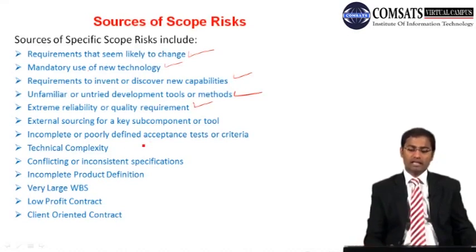External sourcing for a key subcomponent or tool. You are relying heavily on your suppliers, and one of the suppliers has faced a financial crunch, and even if you pay a part or the complete amount to that supplier, still he is not able to arrange the materials or resources. By that time you are left in a risky situation.